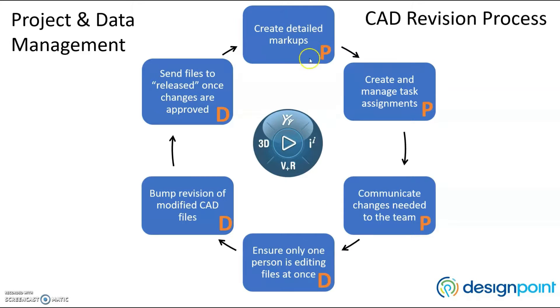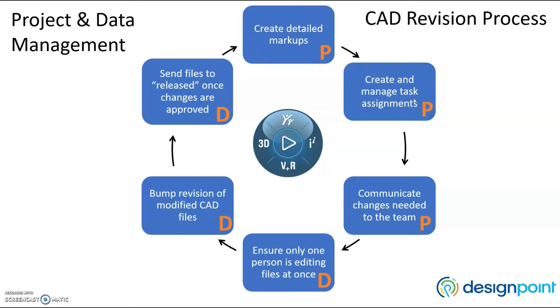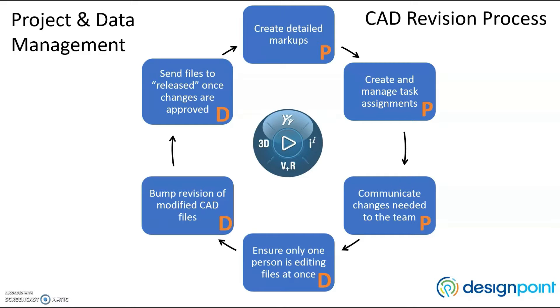We'll start at the top with the manager creating a detailed markup of changes that need to be made. From there, the manager will assign a task to someone on the team notifying them they're responsible to make the changes. After that, the manager will make the rest of the team aware that a change will be made to the project so that everyone is on the same page.